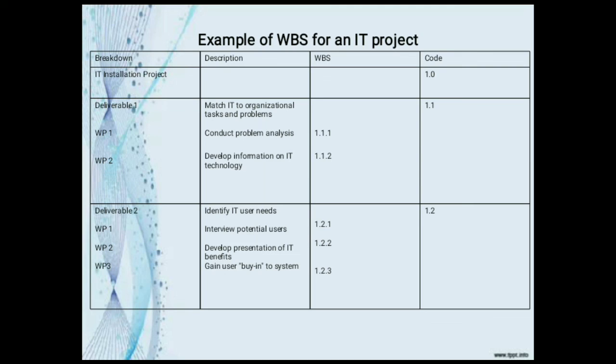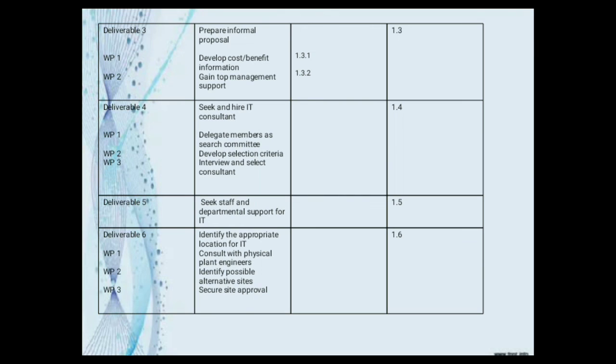My topic is also about work breakdown structure. A work breakdown structure is a tool that can be used for projects, programs, and even initiatives to understand the work that has to be done to successfully produce a deliverable. A work breakdown structure serves as your map through complicated projects. Your project scope may include several phases or smaller sub-projects, and even those sub-projects can be broken down into tasks, deliverables, and work packages. WBS can help you manage those items and gain clarity into the details needed to accomplish every aspect of your project scope.